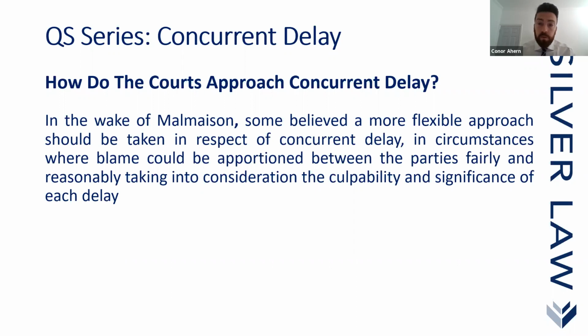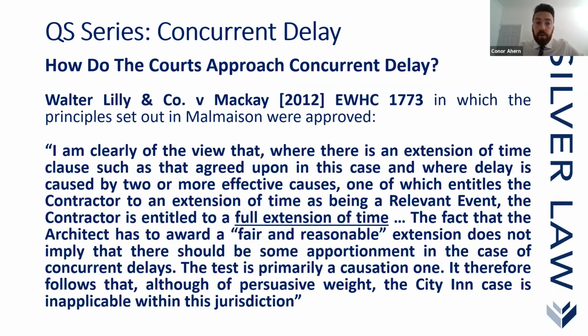What they established was that they would look at the delay events and basically apportion risk of each event to either the employer or the contractor. I don't go into it in too much detail here, because we're focusing on the position in England and Wales, but that is an approach that has been taken in Scotland. It's not followed here in England and Wales. The Malmaison approach is the one that still applies here, as will be confirmed in the case of Walter Lilly versus McCoy.